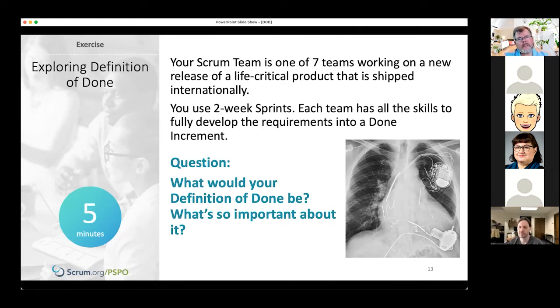What else about this international? Paul, you were going to say something in there too. Yeah, I was going to say, obviously, whatever's in those backlog items that we have said, the acceptance criteria, that has to meet the acceptance criteria. What did we say this was going to do? Does it do what we said they asked us to build? Right? Not just the testing. I mean, if we've not done it, how do we know we've hit all those? Everything is testable if we have not bumped it up against the acceptance criteria. Exactly right.